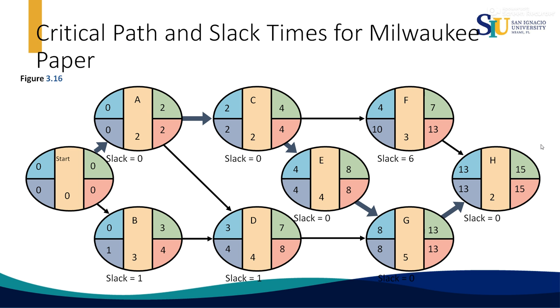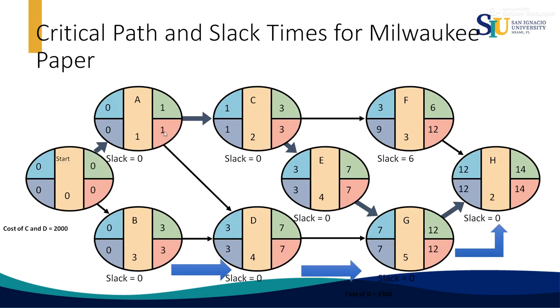Then this is the original critical path method, if you remember. Crashing the original activity A, which had 2, in the new critical path activity A has a duration of 1. We recalculate the critical path. Now the duration of the project is going to be 14 weeks. Still, we need to crash another week.